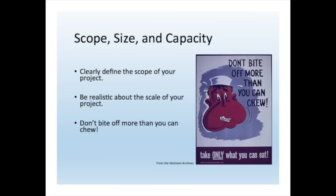A project might have time constraints or deadlines, and you want to right-size your content to fit within those constraints. If you're new to digitization, you might not have a sense of how long the various steps will take, so you might consider a small pilot project to gather that kind of data before jumping into a big project with the risks of overruns or non-completion. As a cataloger by trade, I would note that it's really important to account for the time you'll need to describe the content. Be realistic about the scale of your project and don't bite off more than you can chew.